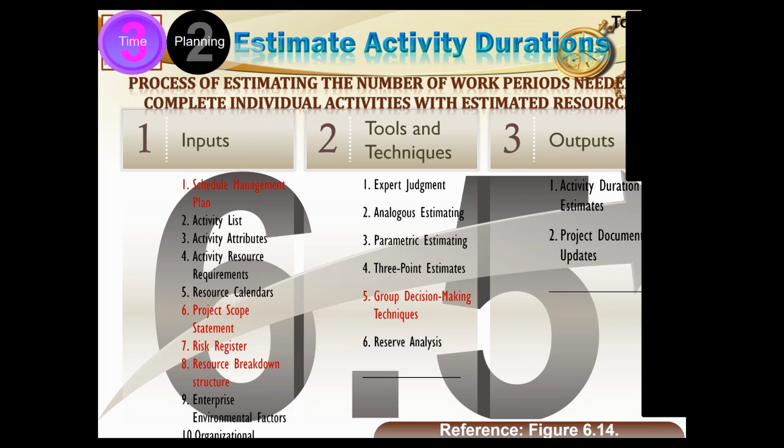So probably you are at more risk of not accomplishing your job in that duration. So those people who are extra cautious, they take the maximum time which anyone has ever taken before. So if somebody has done a similar job in 10 days, that is the maximum time, I would take 10 days. So in this, you are actually blocking the way of opportunity.